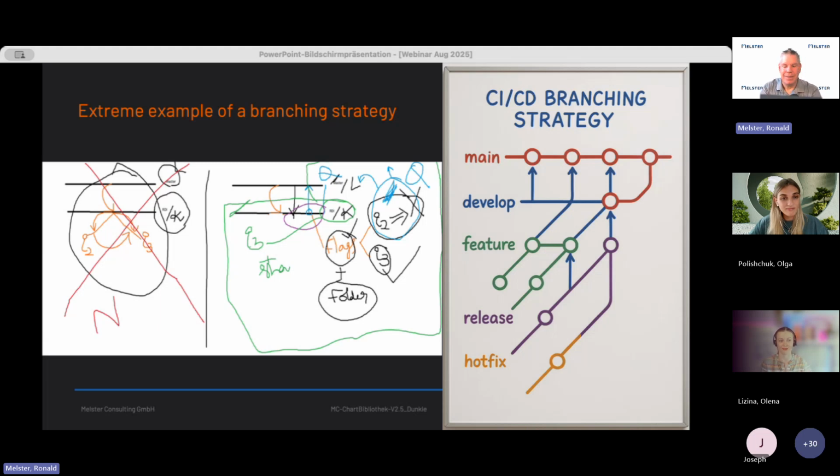Why, you may ask? The strategy must be available for everyone who shall follow it. So it must be available when you need it and not wiped out on the Friday office cleanup. It must be baselined, which is very hard to achieve with a whiteboard. And there must be some kind of change history so that no one can claim, oh, I told you yesterday and it was on the whiteboard yesterday. We need an official change history. And I think I mentioned already, it must be accessible to everyone who needs it, not just the one sitting in front of the whiteboard.